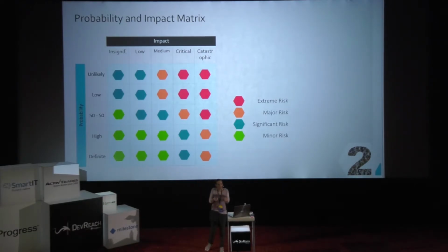Okay? So what I usually do, what is a good practice with a team in a conference room, is put on a big screen the risk registry where we identify the risks, and then this matrix, and I challenge the team to come up with the idea of what the probability and the impact would be. So it's not good if the team leader is doing it alone. And just for the sake of this presentation and to fit in the time slot that I have, I will not do this now with you.